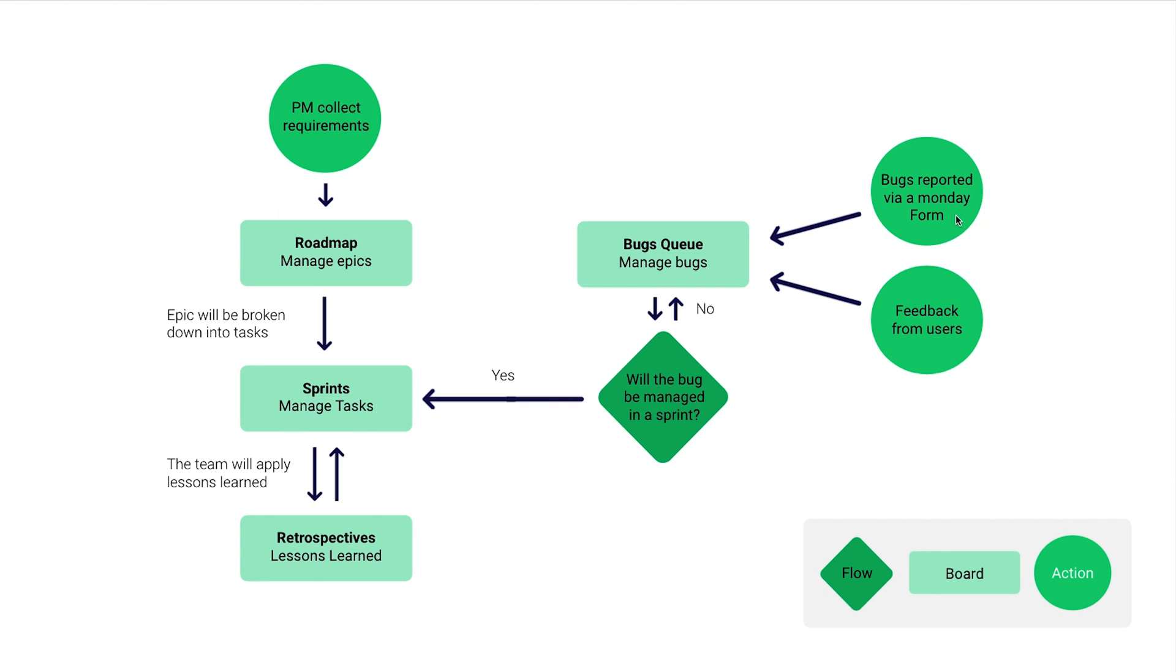Then we can either manage it on the bugs board itself, or if this is an area we're already going to focus on in a specific sprint, we can manage it as part of the sprint. We have an indication of whether we want to manage it as part of a sprint, and it would then become a task in our sprints board.